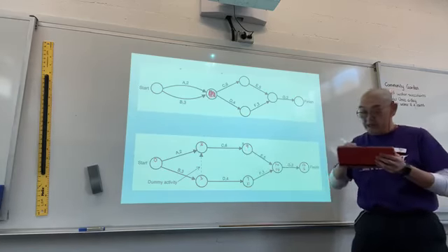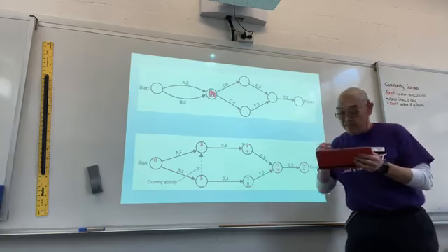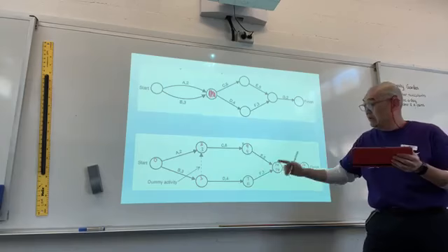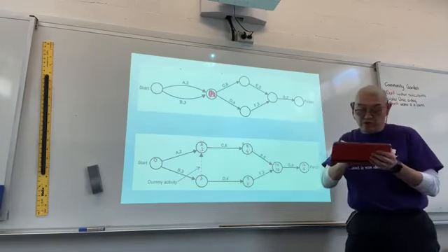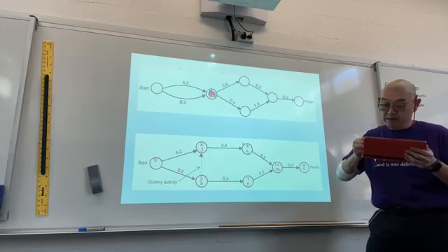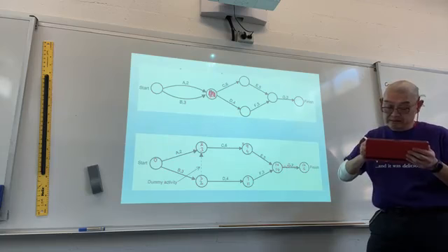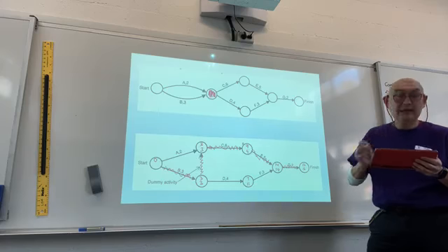So that will be 9. 9 minus 6 will give me 3. Now 11 minus 4 will give me 7. 3 minus 0 will give me 3. So therefore you know the critical path is this. It includes a dummy, and that's it.